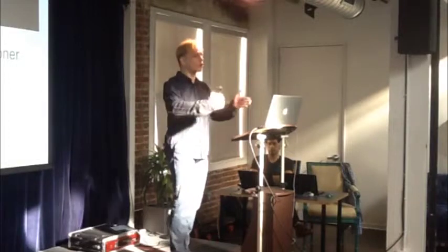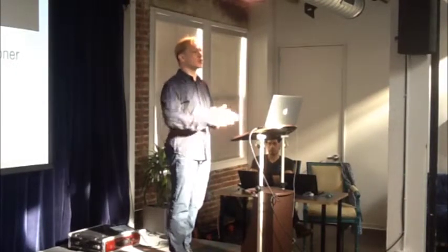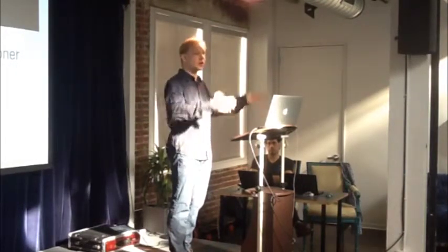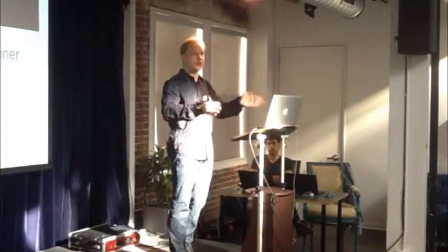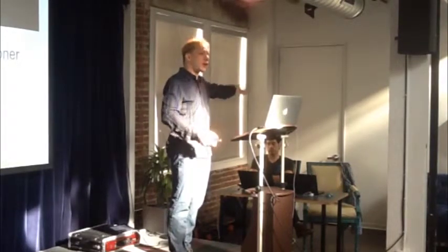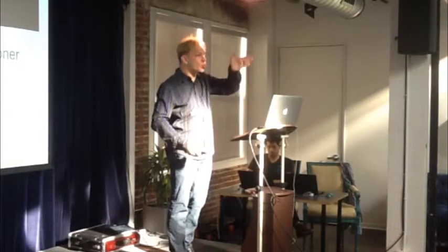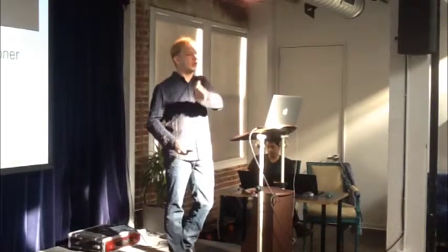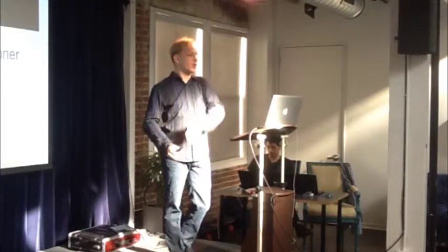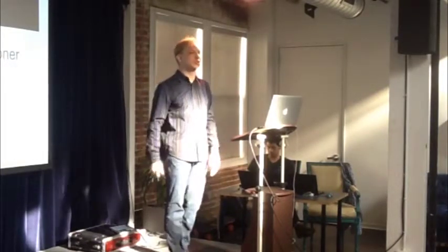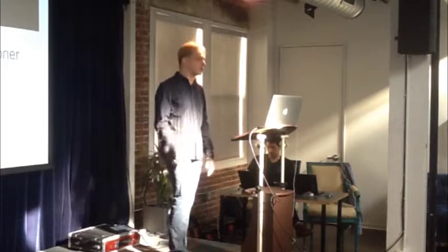You're trying to see how far you have gotten so that you are budgeting based on empirical, historical data of how your business is performing. That is how you beat all those estimation fallacies, is you look at real progress. What have we done and what did that cost us, and use that to predict future success. Rapid iteration is the solution to that.